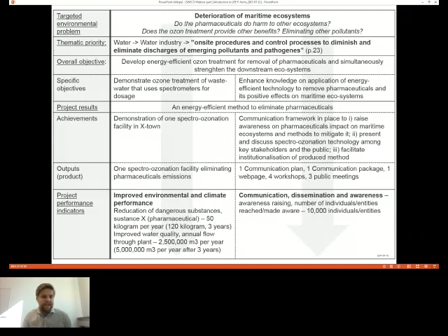We will hold at least 4 workshops and 3 public meetings with the citizens. This is quite clear products where we can actually submit the protocol afterwards to our case officer and say, see, we held a meeting, please pay us the money now. And finally, we come down to the performance indicators. And the performance indicators are given, as we have said before.